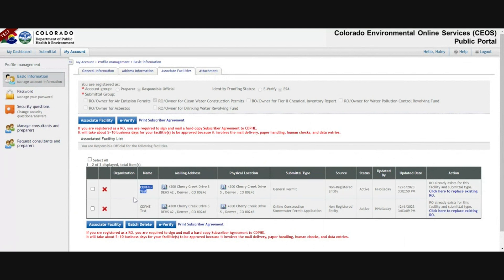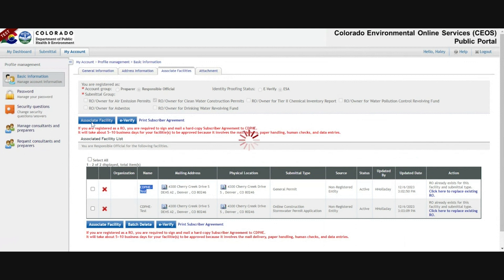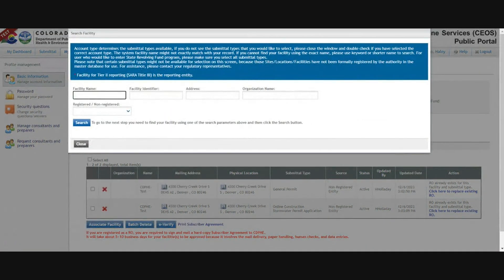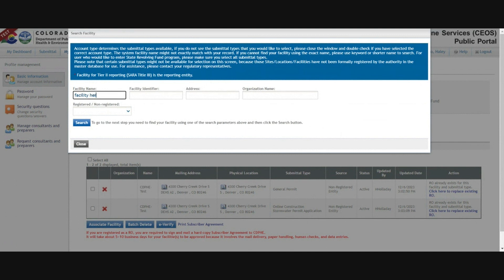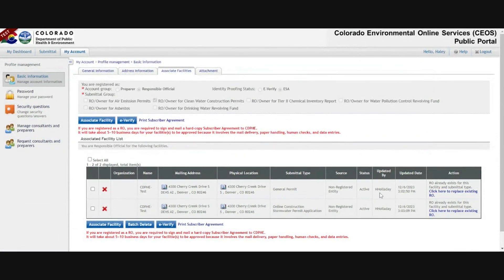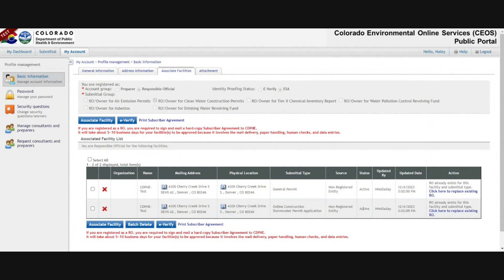If you have an active permit that you applied for within COS, it should already appear on this page, in which case you're good to go for a renewal application. If you don't see your permitted facility on this page, you need to start by associating it with your account by clicking associate facility, and then searching the exact facility name on your permit. Leave all other fields blank and click search. Once found, check the box for online construction stormwater permit.